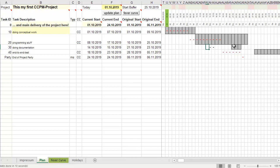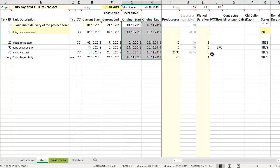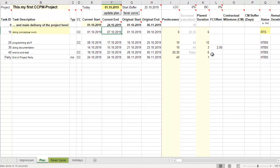One small information. In the third part we will talk about execution management, and that's why I didn't explain it there in detail. I'll show it to you here. Critical Chain uses typically two project plans. This is the original plan, and this is the current plan shown as dots in the Gantt diagram. The current plan is called current plan because in execution management, this plan is updated regularly.